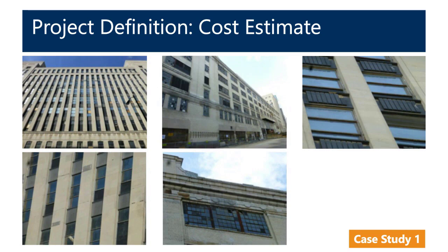From grade, looking, the AE can walk around the building, look at where the distress is, if there are symptomatic, typical locations where it's occurring, if there's a one-off condition, again, what is the stress in the material and what might be causing it, so you can get an idea of the type of repair to summarize and get costs for a competitive bid across contractors.